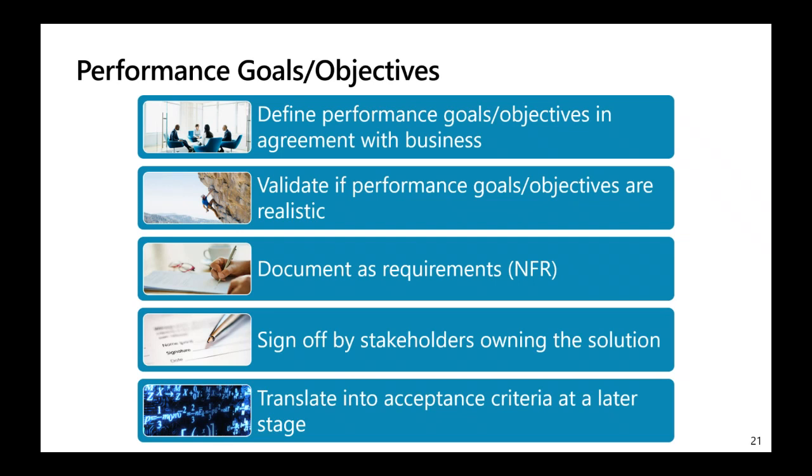As a next step, the typically less specific performance goal should be translated into acceptance criteria. It is uncommon for a developer to deeply understand the business context of the system for which they are developing code. A developer likely might not have experienced the time-pressured environment of a call center, for example, or order fulfillment center, and therefore won't be able to judge the need for performance. And therefore, specific performance goals should be translated into acceptance criteria or functional requirements to ensure that developers have visibility to performance constraints on the functionality for which they are responsible.